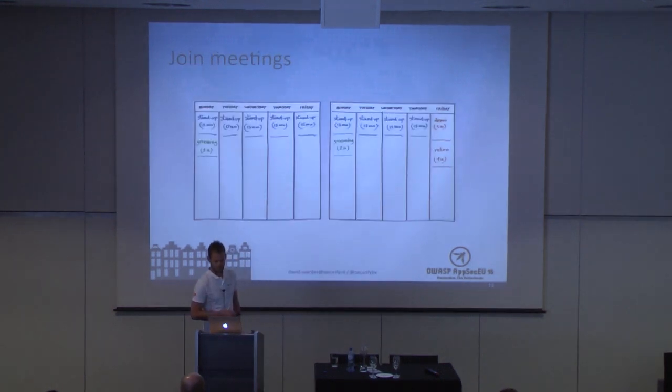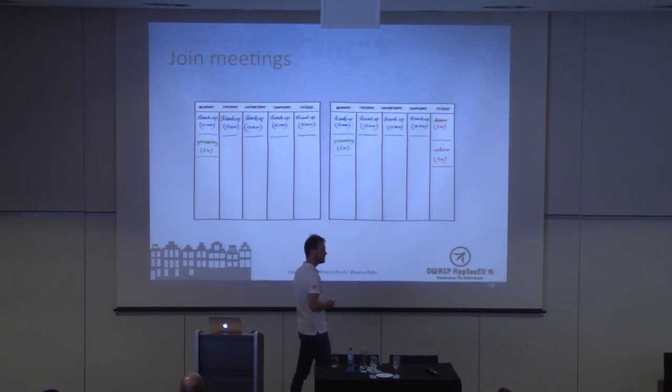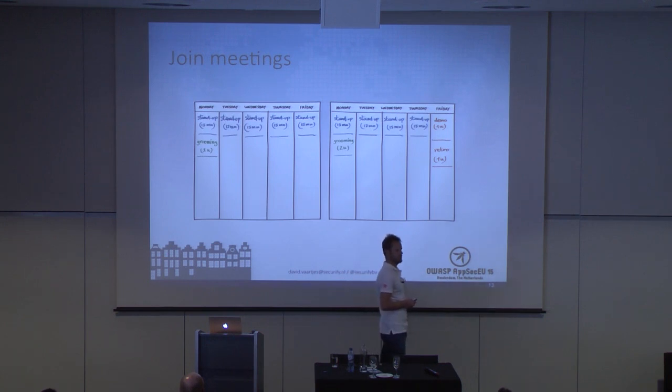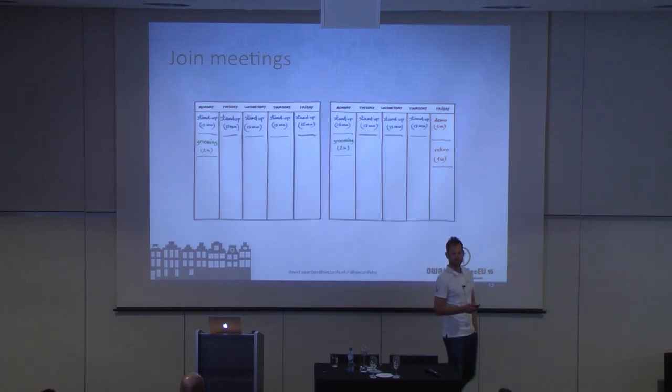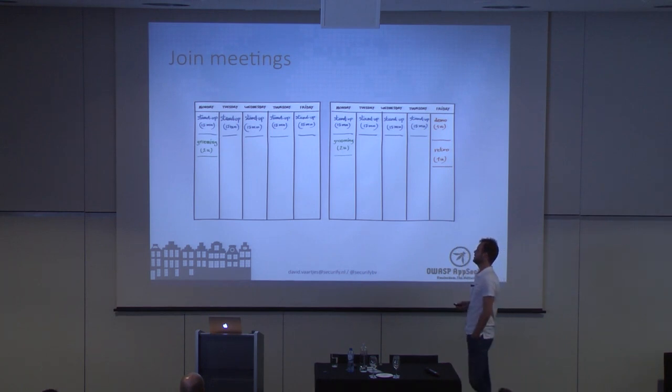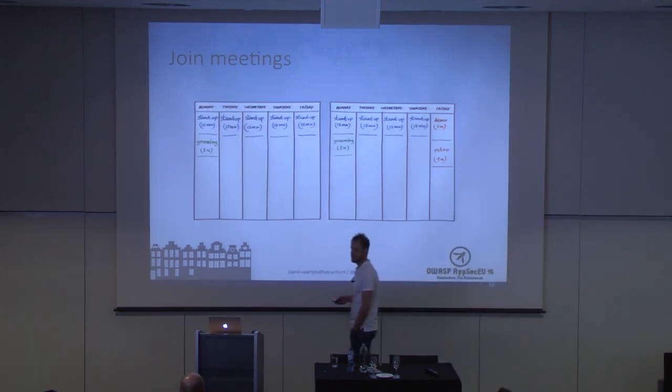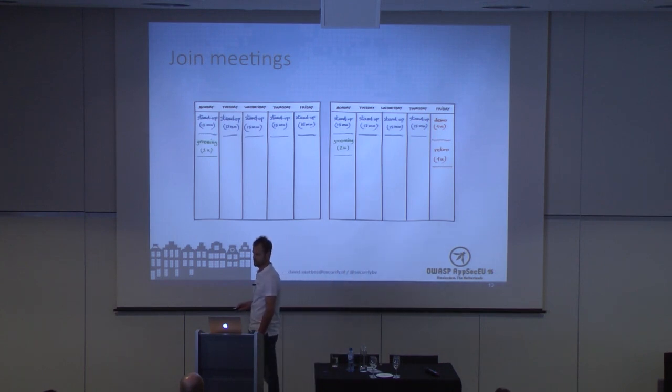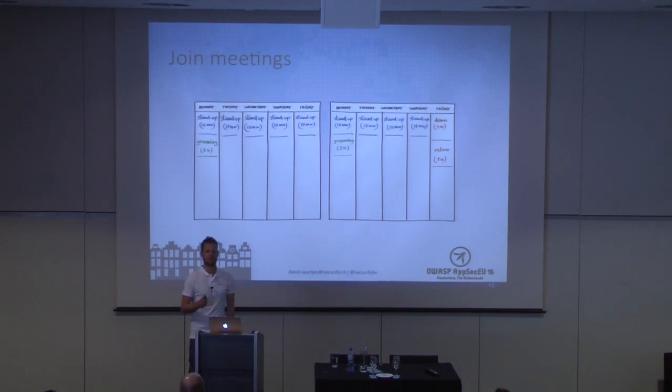So the first thing I did, because back then I was a complete Agile noob, I didn't know much about Agile and how this team actually worked. So I studied Agile and I started to just join this team. This was basically their schedule. They, of course, had a daily stand-up every day. They had sprint cycles of 2 weeks. They have a grooming session at the beginning of each week and a demo and a retro at the end. So I just started to join them here and there. And I only had about 6 to 8 hours per week to spend on this.